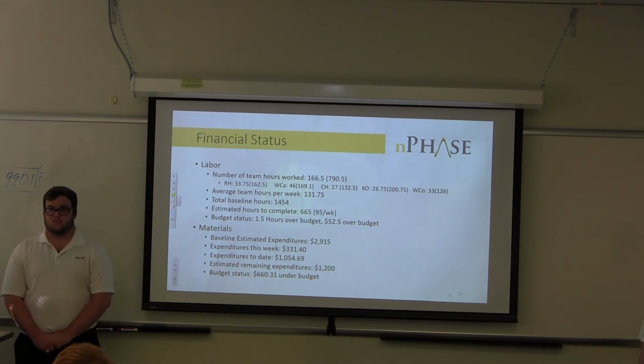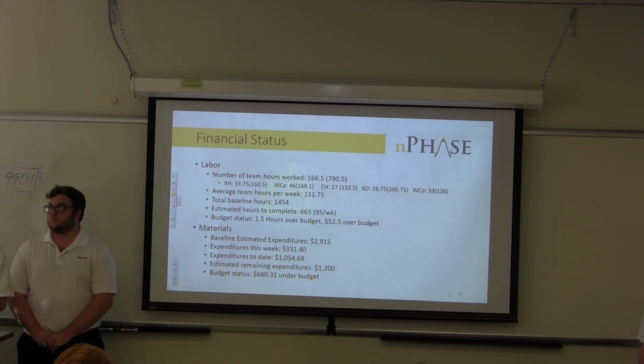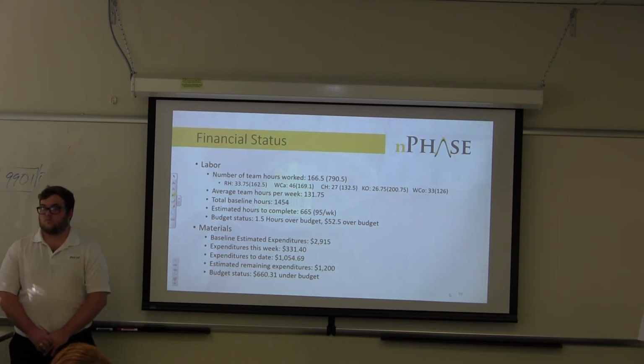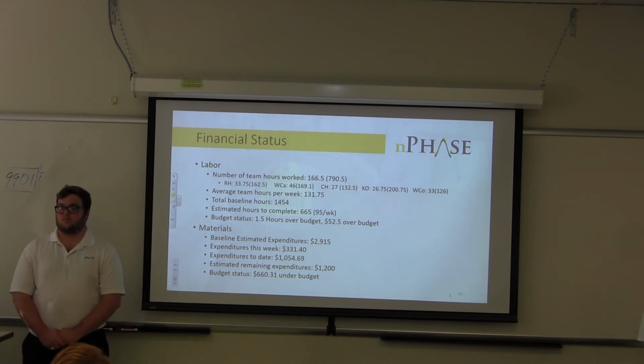Cool. Can you share with us how you computed your estimated hours to complete? We actually have an Excel sheet that I created with all of our tasks, and every week I have every member who's the leader in that task go through and give us how much time they think that task is going to take to complete as of now. At the very end, it totals that all up for us and gives us our hours estimated. And you're really that close to your baseline? At the moment, yes.